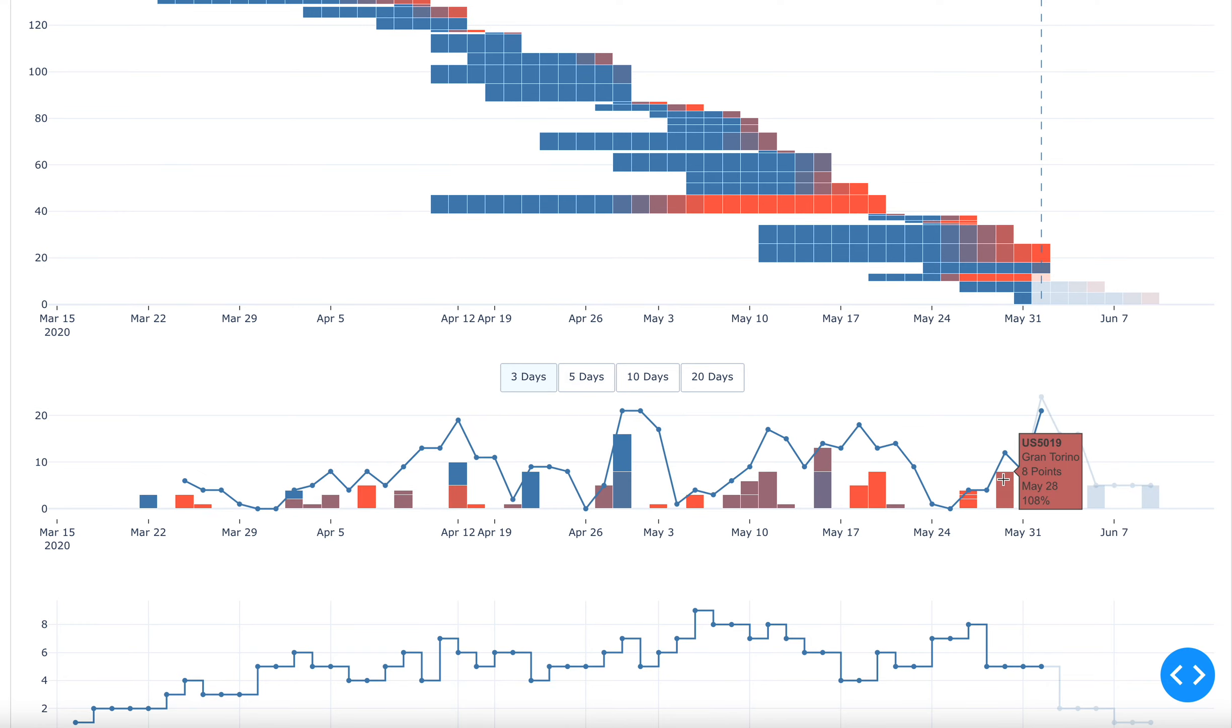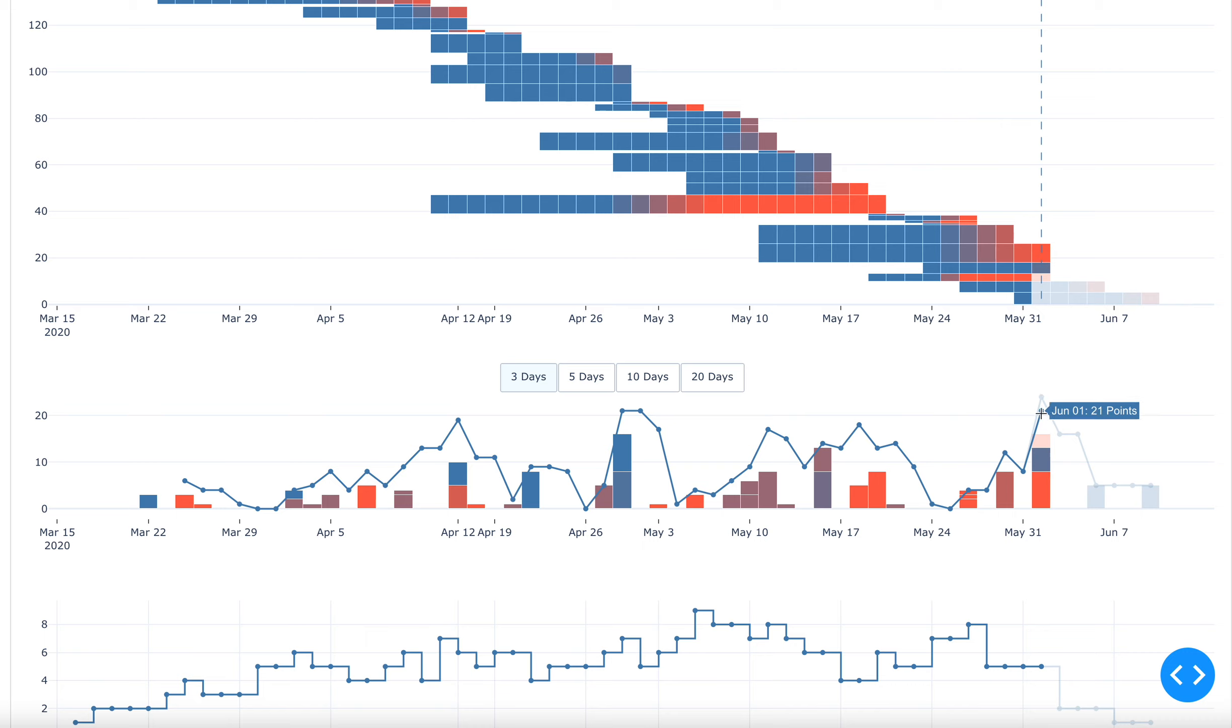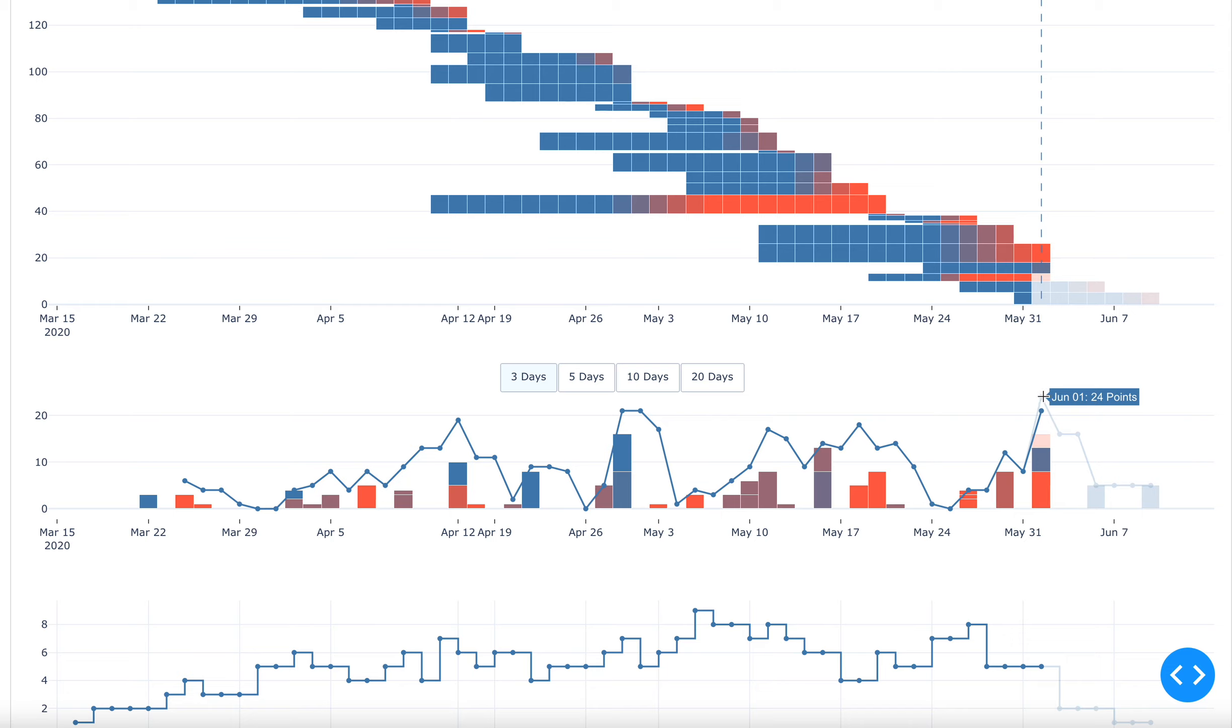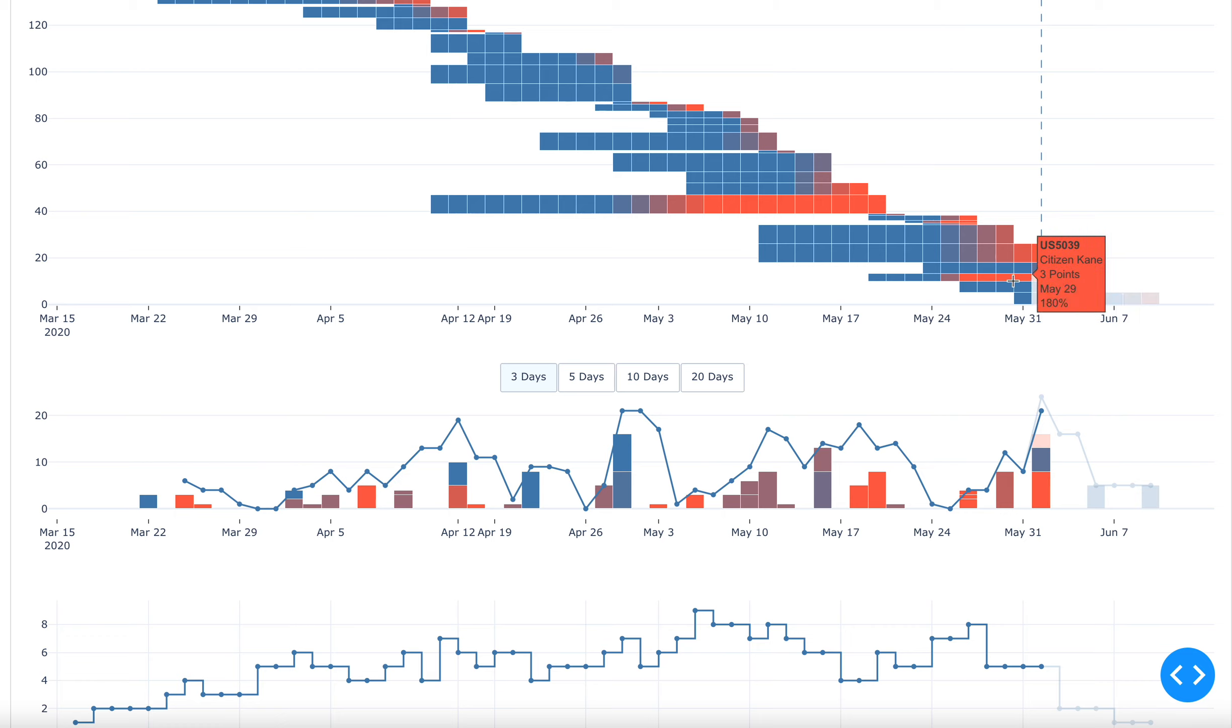It also shows you the projected data here. The ghosted out line is here, the projected line based on what is already in flight. For example, for today, this could still go up to 24 points from 21, because this one story here, the three pointer is already overdue. So it may well complete over the course of the day.